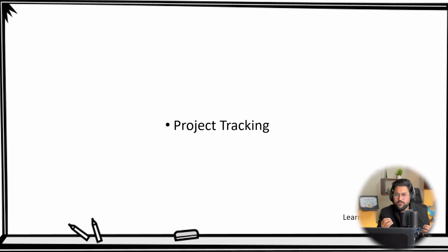And within the tracking phase, you have to consider what the priorities are, like physical percent complete. You have to make your project progress tracking based on physical percent complete, duration percent complete, or man-hours tracking, right? And then there are many other bases as well, which I have explained in my comprehensive training, which is not possible in one single session.